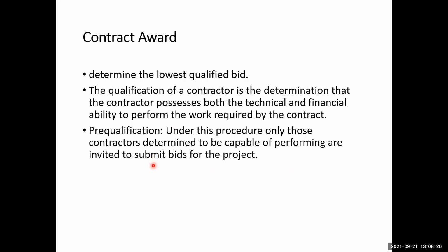Okay, so that means before the bidding, the various big clients such as the government organizations establish some kind of process by which they ask the different potential bidders to submit their capability documents. Based on those capability documents, they pre-qualify them for submitting bids. So some of the capable ones are pre-qualified, but some cannot be qualified.